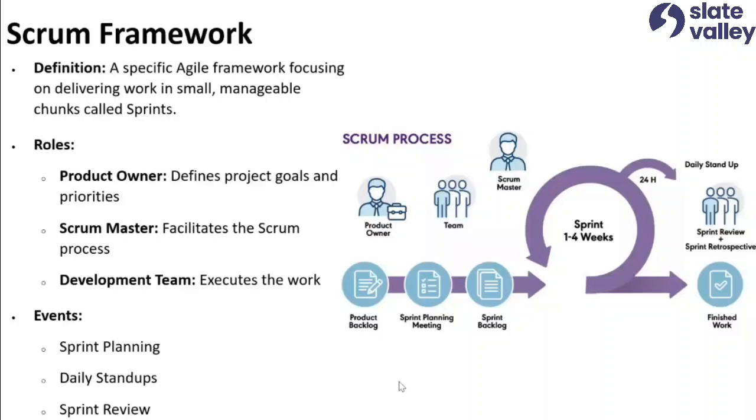What did we achieve? This is what is discussed in sprint review. And there is one more ceremony called sprint retrospective. If you can see here, you have retrospective, right? Sprint review and retrospective. Retrospective is a meeting or a Scrum ceremony, basically, which says what happened in our sprint. Did we achieve our goals? What good happened? What bad happened? What are the lessons learned? How do we improve our process?